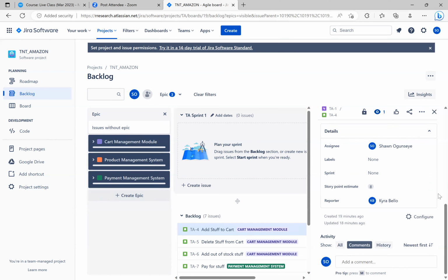So if you say this story is 8 points, that means we can add about 5 user stories such as this to our sprint, since 8 times 5 is 40 and we can undertake 40.